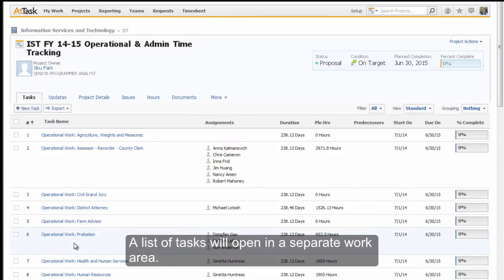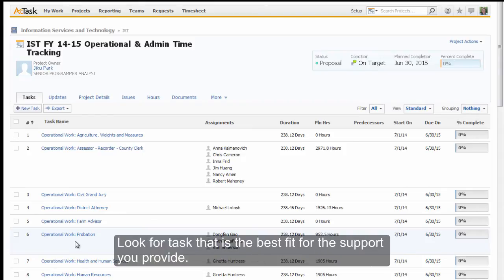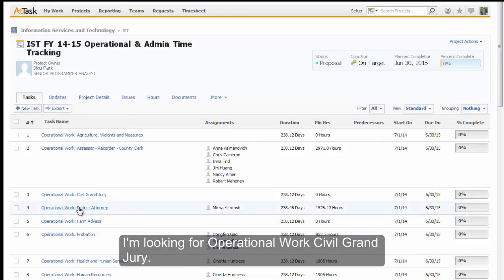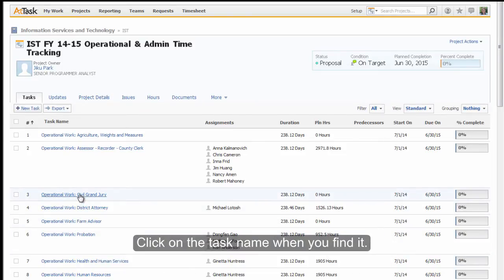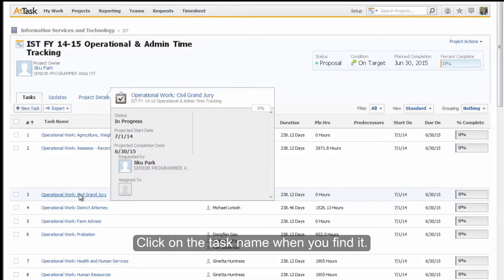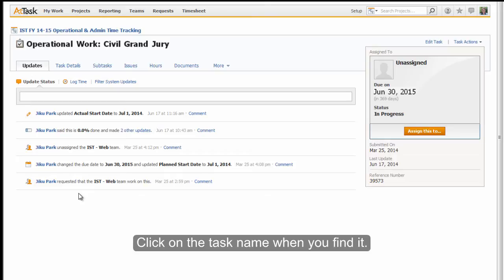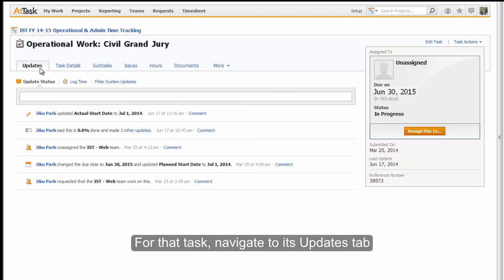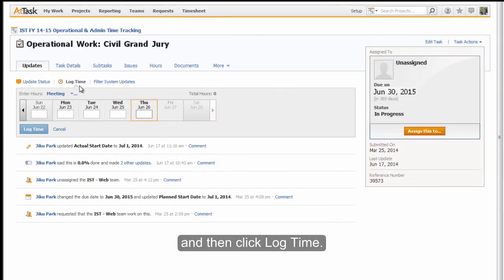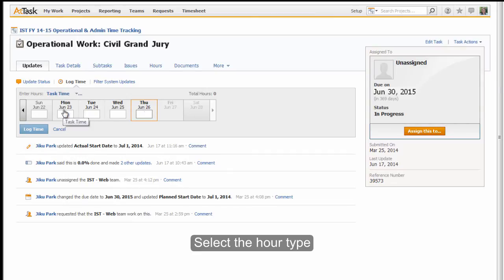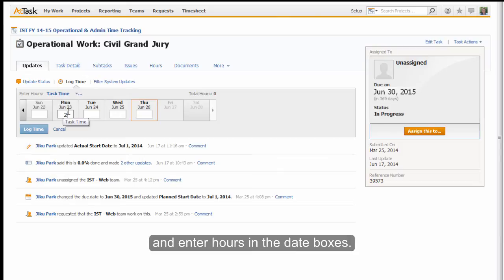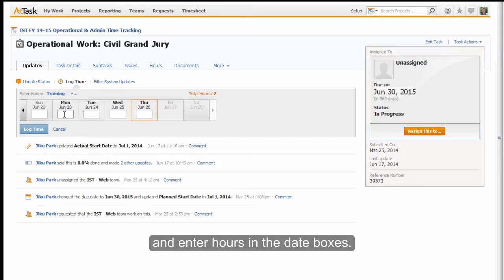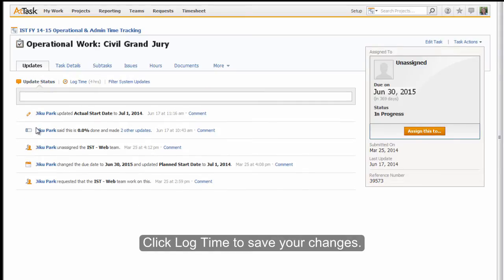A list of tasks will open in a separate work area. Look for the task that is the best fit for the support you provide. I'm looking for Operational Work Civil Grand Jury. Click on the task name when you find it. For that task, navigate to its Updates tab and then click Log Time. Select the hour type and enter hours in the date boxes. Click Log Time to save your changes.